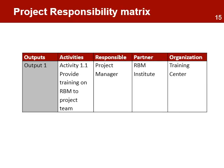The responsibility matrix lists all the people, including partners and other actors, who have a responsibility to complete an activity or a task. All tasks and activities identified in the WBS should have an owner. The matrix can be expanded to include people that will provide support to the person or group responsible for the project work.